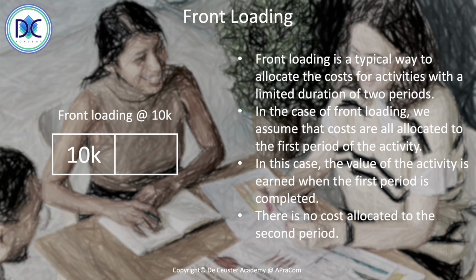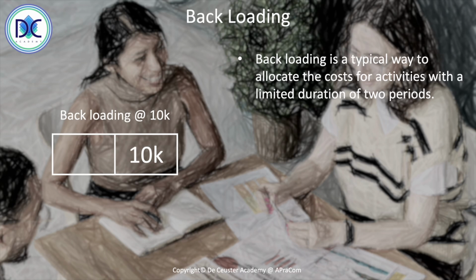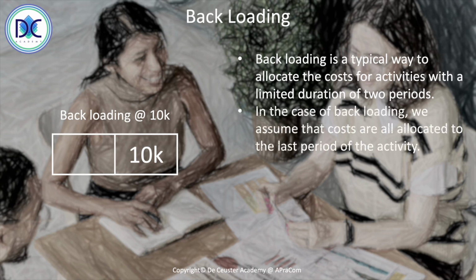Backloading is a similar approach, again when we have a limited duration of 2 periods, but now we earn everything at the end. So when the work is completed, we earn everything. And that's also a typical way to work in certain cases.